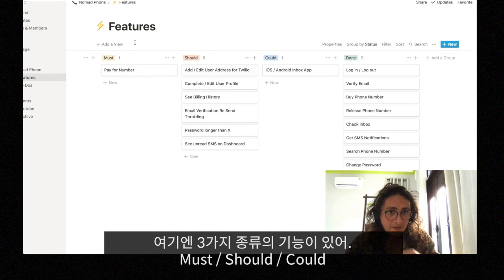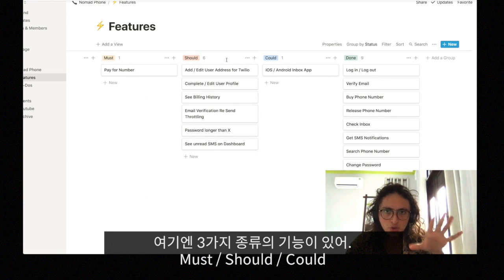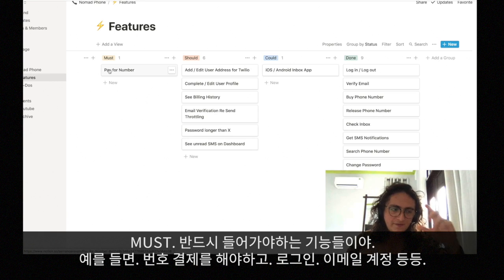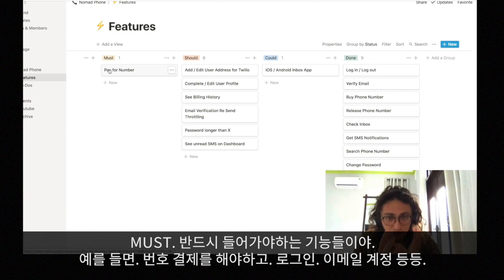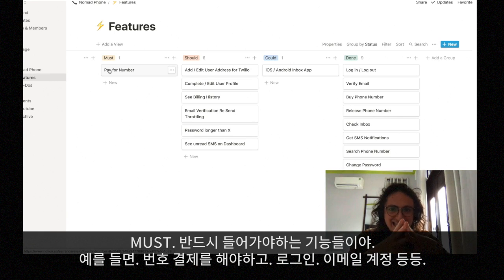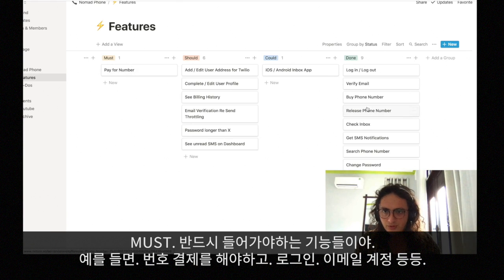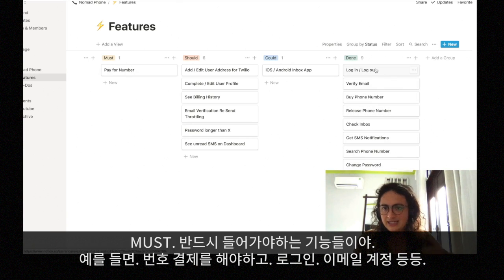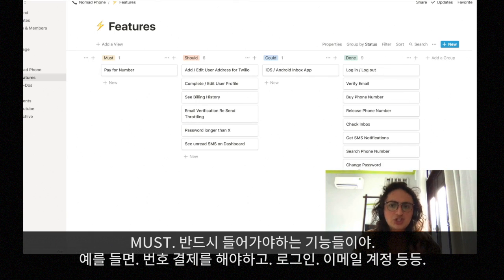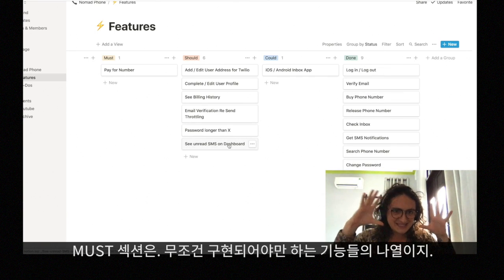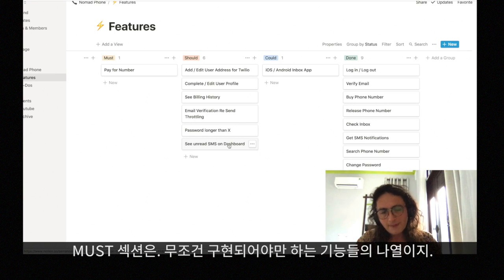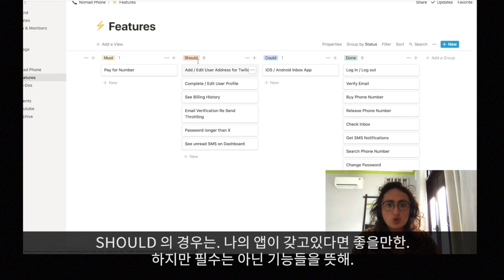There are three kinds of features: Must, Should, and Could. 'Must' are features that my product absolutely needs to survive — for example, being able to pay for a number, log in, buy a phone number, change my email, change my password. Everything that is necessary for the app goes into 'Must.'